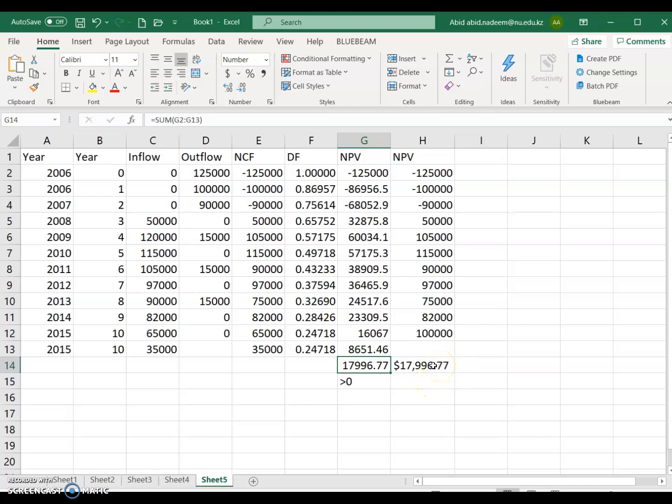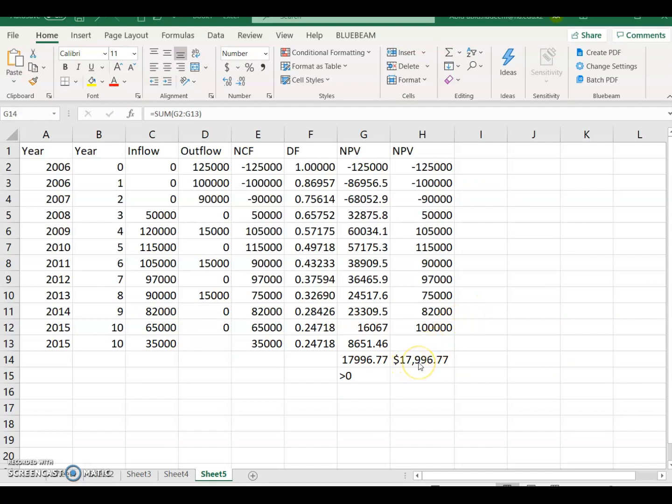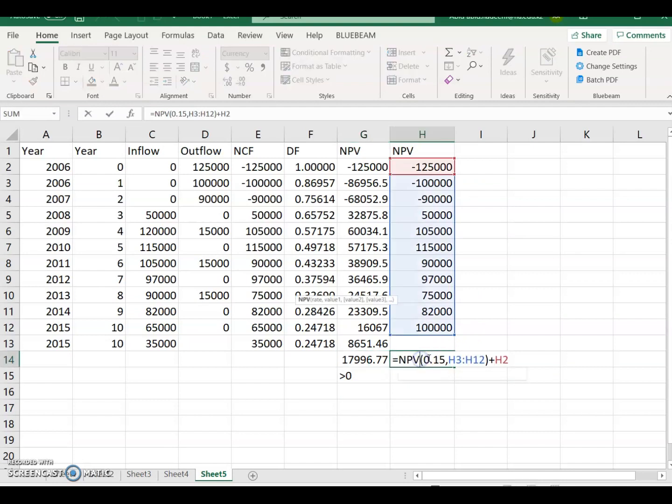As an alternative, you can also change the different parameters and then see the effect on the value. So for example, if the hurdle rate changes from 12% to 14%, you can just change the value of the hurdle rate from here, because 3% was the inflation rate, 12% was the hurdle rate.